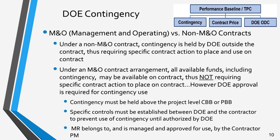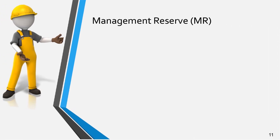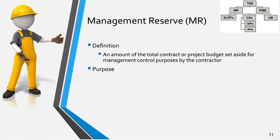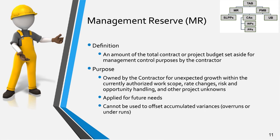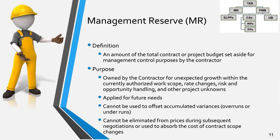The contract project managers are responsible for establishing and managing the MR. Approval for MR use outside the contractor PM is not required. Management Reserve, or MR, is an amount of the total budget set aside by the contractor from the TAB for management control purposes. The purpose of Management Reserve is to have budget that can be applied due to unexpected growth within the currently authorized work scope, rate changes, risk handling, and other project unknowns.